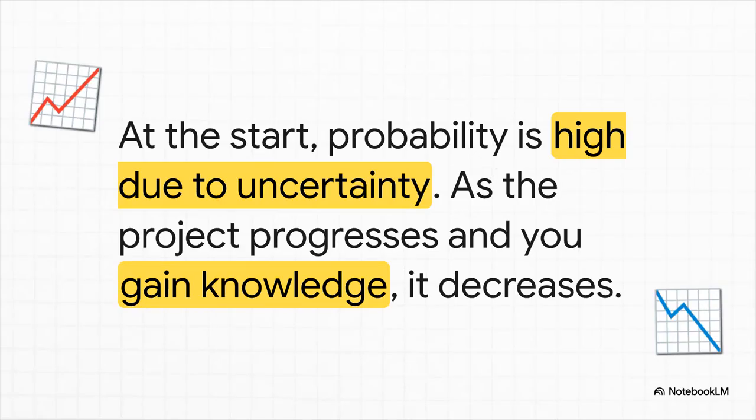Think about how risk changes over time. At the very beginning of a project, there are a ton of unknowns, right? So the probability, the chance of certain risks happening is pretty high. But as you move forward, as you learn more and make progress, a lot of that uncertainty disappears, and so does the likelihood of those risks.